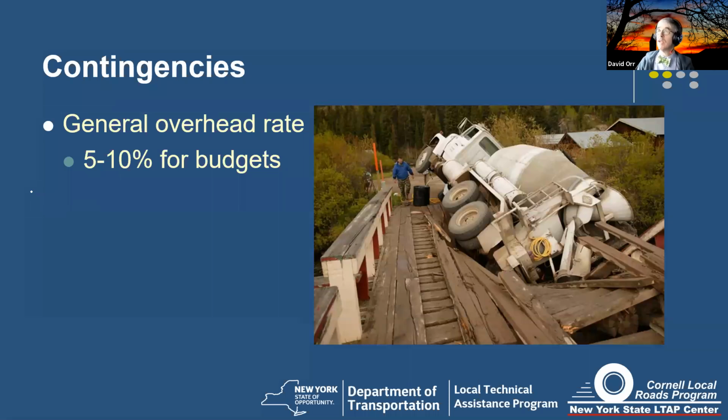The rate may depend on how rough the estimate might be. Yeah, absolutely. You may have variations in terms of how your estimates are working out. If you haven't done it in a while, maybe you have a slightly higher rate. If it's like chip seals that you do every year, you get that one down to 4 or 5%. My last year or two when I was with Yates County, I was using a rate of 5%. I had real good numbers, and I was pretty good in terms of knowing exactly what the cost would be for the projects we did on a regular basis. And that's probably going to be true for all of you as well.